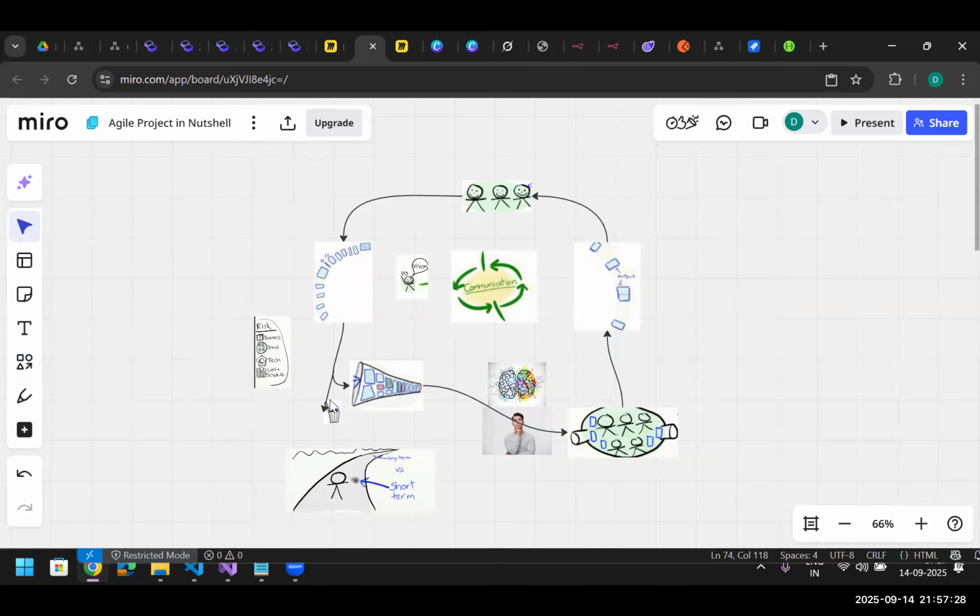All these will be decided before going to the capacity. The capacity means the engineering team may be 15 or 10. They cannot take 100 requirements, right? Only we should be able to filter. That's what we call refinement. This is like crude oil coming here, so we should be able to extract kerosene, gasoline, everything. And what is important, that only we need to give. And they will develop the application features. This is the application features like an output. That output is going to be showcased again to the end user like a PO.